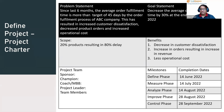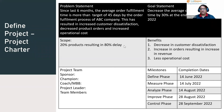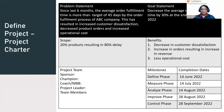The milestones or completion dates are defined by the project team — it is up to them to determine how much time to take to complete each DMAIC phase within four months. For example: Define phase complete by 14 June, Measure phase by 14 July, Analyze phase one month later, Improve phase by 28 August (about two weeks), and the Control phase completed within one month after that.